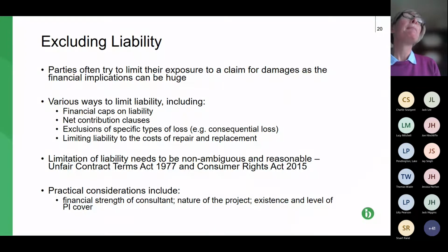And also, finally, even if the tender with those exclusion clauses is appended to the contract, there typically will be a clause which will say that if there's an ambiguity in the contract, that ambiguity is to be dealt with in a certain way. Typically that will say the contractor deals with it at its cost. So that could very well mean that the exclusion of liability is deemed to be ambiguous with other clauses in the contract, so it doesn't apply because it's dealt with at the contractor's cost.